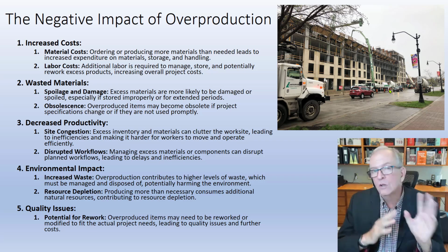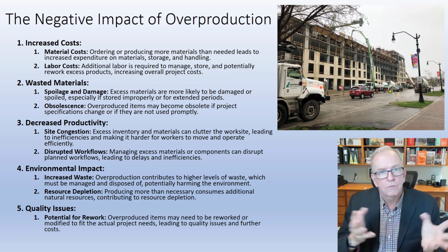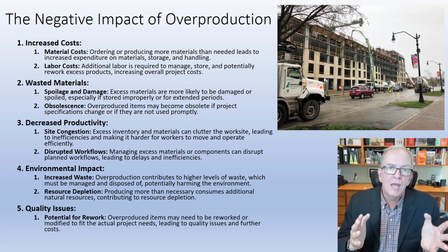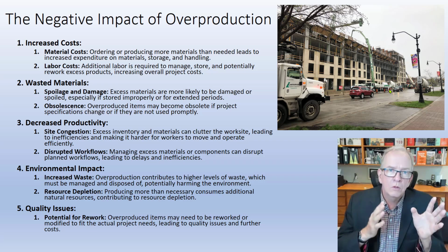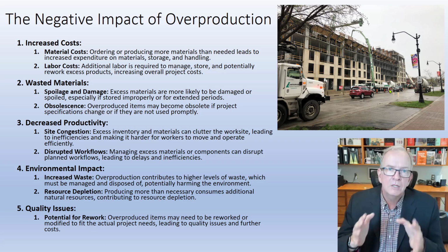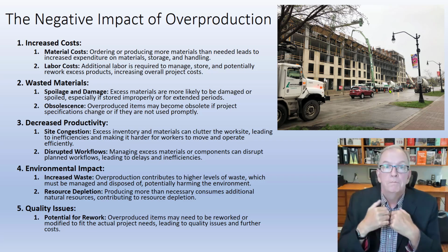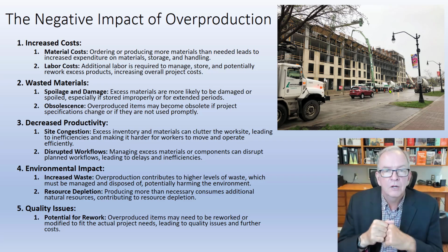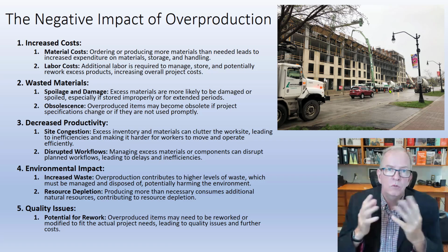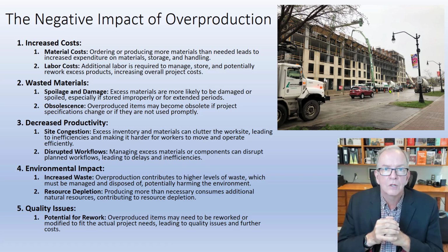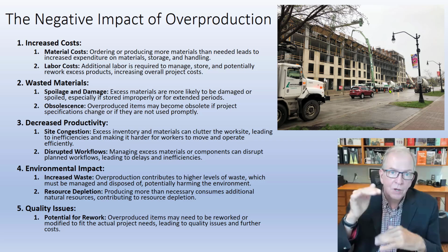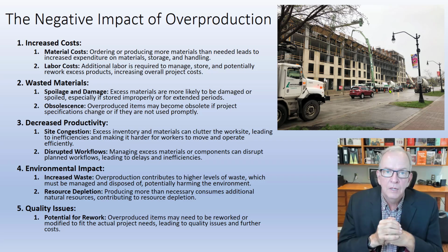Okay, so that's looking at something. We did it, not much you can do about it now, but what steps can we put into place so that we don't do that again? That we narrow the actual buffer of materials that we need. And in lean construction we talk about buffers a lot, and so buffers could be basically an inventory buffer. Basically you've got extra of something.